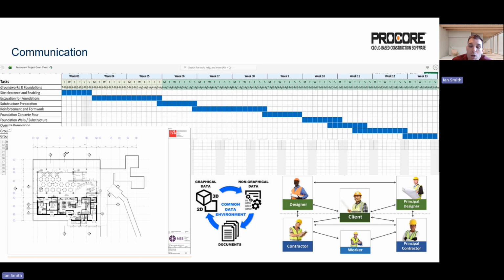This will include the timeline of the entire project plus the individual timelines, as we can see here, for the 10-week groundworks and foundation phase. Communicating this program ensures that when subcontractors and suppliers know when their work is scheduled, they can prepare the necessary labour, materials and equipment.